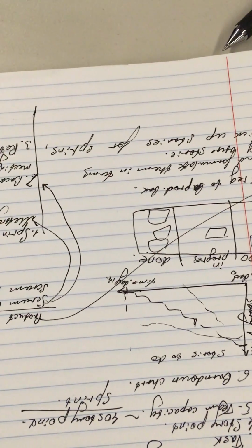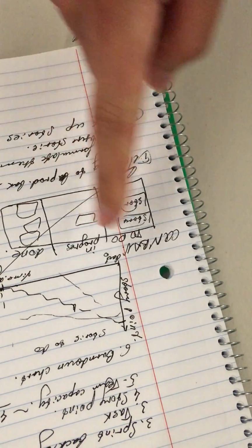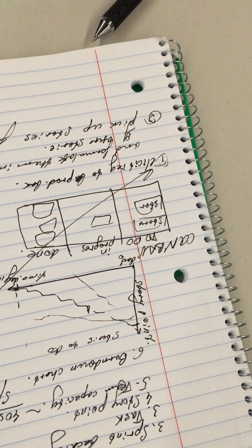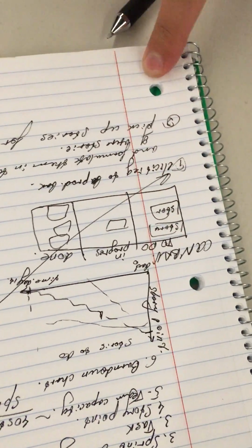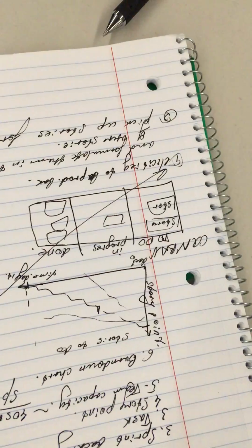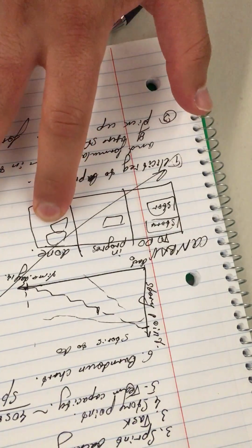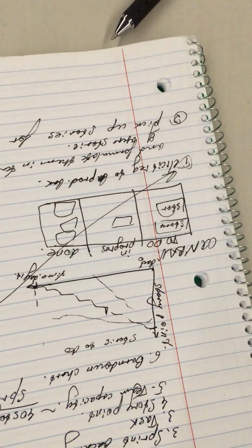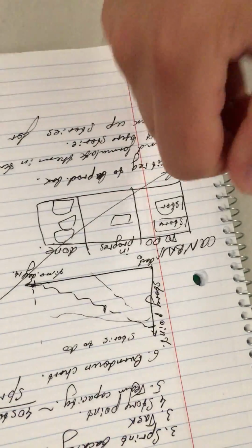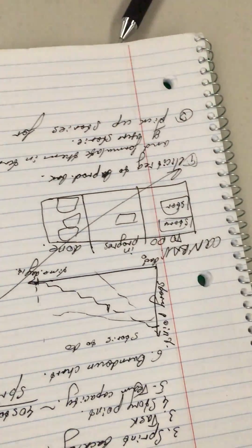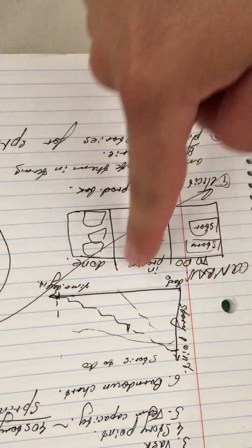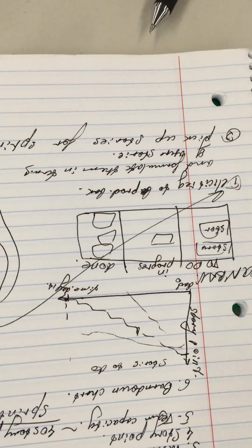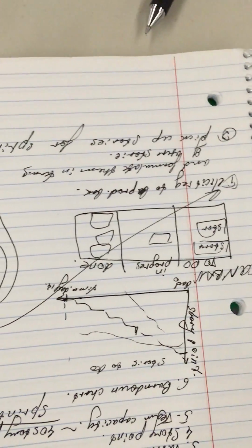Here's the thing. A lot of stories. At the very beginning, where are they on this chart? At the 0, just all of them here, in to do. During the time you drag and drop them. As soon as something goes to done, we subtract the stories from the cumulative to do, and that's why the time gets deducted, and this burn down is going to go down. Okay, so basically, that's how it works.